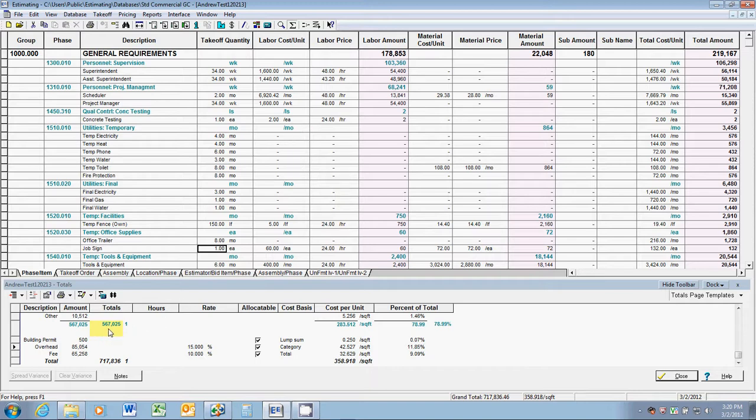You see our costs went up to $567,000 from $528,000. That's well over a $30,000 increase. Our profit, what was it at? About $60,000. Cost went up $30,000. That's half of our profit. Half of our profit, because we went over by two months.